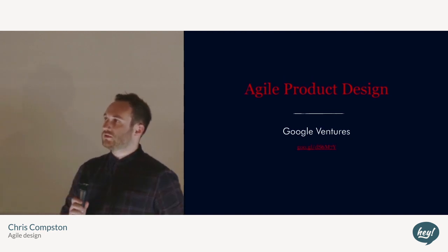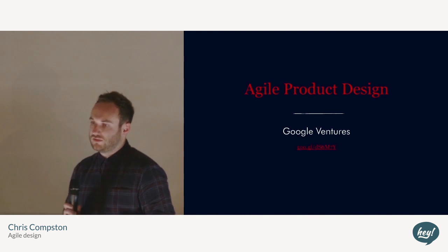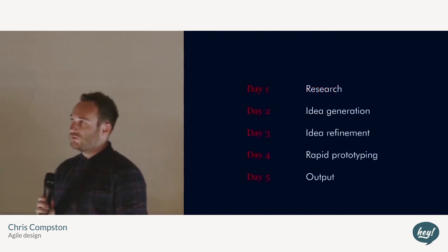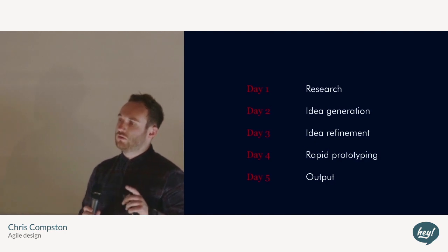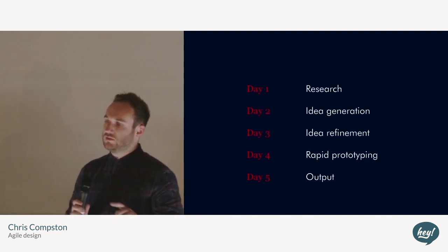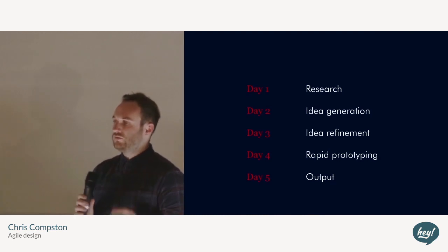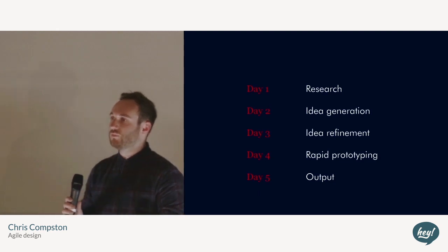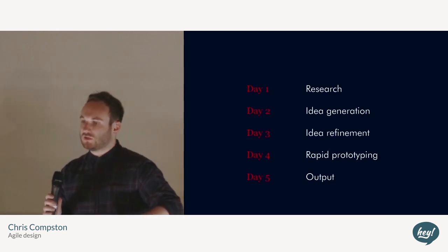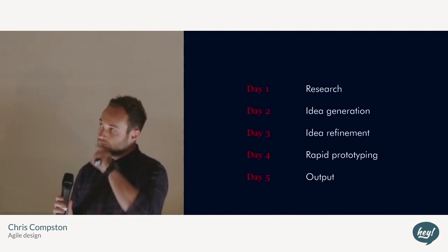It's all about getting ideas out. So you spend a whole day, it's a week-long process, you spend the whole day doing research into the company, into the product, into the users. That's all that one day is. On that one day, you book your user testing for the 5th day. So you've already booked all the users you're going to use on that 5th day. It gives you a time limit. You know that by that 5th day, you're going to have something for someone to test. So it really gets you going, so that you know that on the 4th day you're providing something for them.